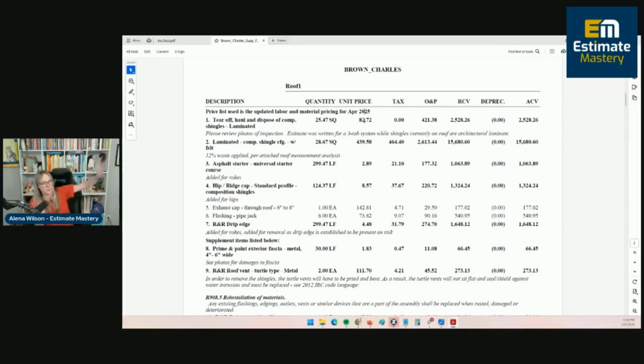If the job's going to be done in April, cool. Let's go ahead and reprice it for April. In that scenario where it's going to be done at the end of April, we're rolling into May pricing. Usually if it's only over maybe around $100 with the May pricing, it's hard to go down that road. You've got to pick your battles on what you want to dig your teeth into. So in that example, I might run a May price list.